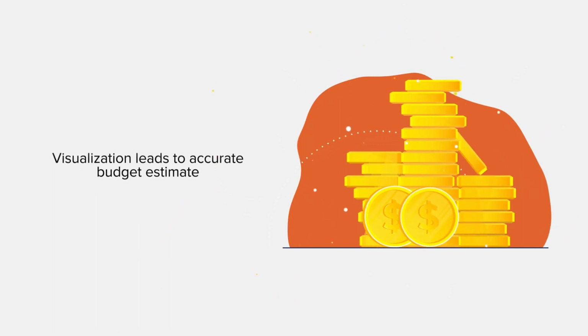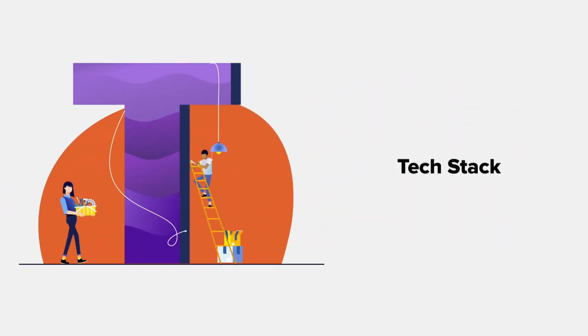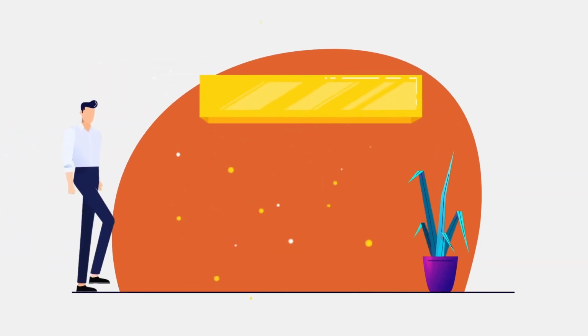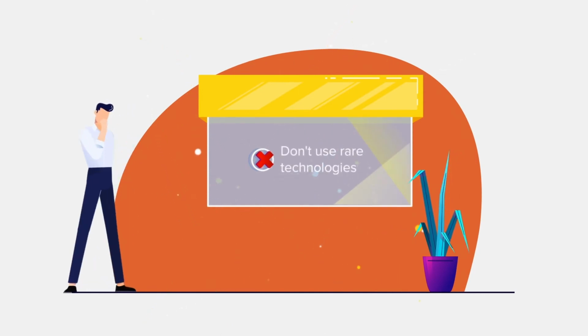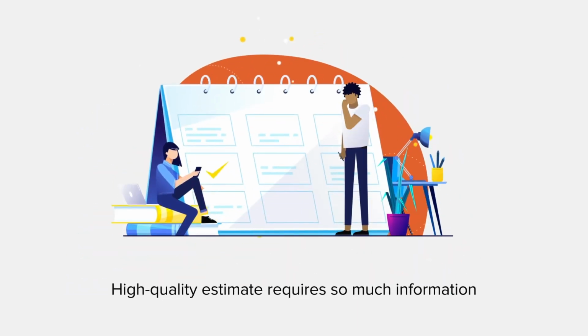Clients don't pay attention to tech stack, especially when it comes to the development of an MVP or prototype, but the tech stack will also affect your budget and future maintenance of the application. Developers with a rare tech stack may be scarce and charge a fortune for their work. You may even find yourself in a position where developers will decline offers to work with you because of the bad tech stack. All of these things are important for any vendor to estimate the project accurately.